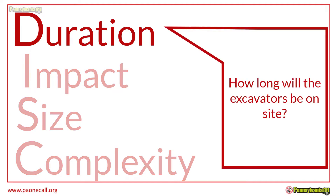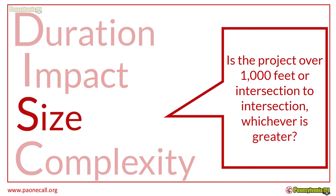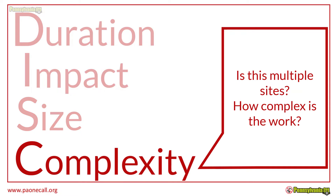Duration: how long will the excavators be on site — a day, a week, a month, a year? Impact: will the work impact the public, facility owners' lines, traffic patterns, or cause other disruptions? Size: is the project over 1,000 feet or intersection to intersection, whichever is greater? Complexity: is this multiple sites, and how complex is the work?